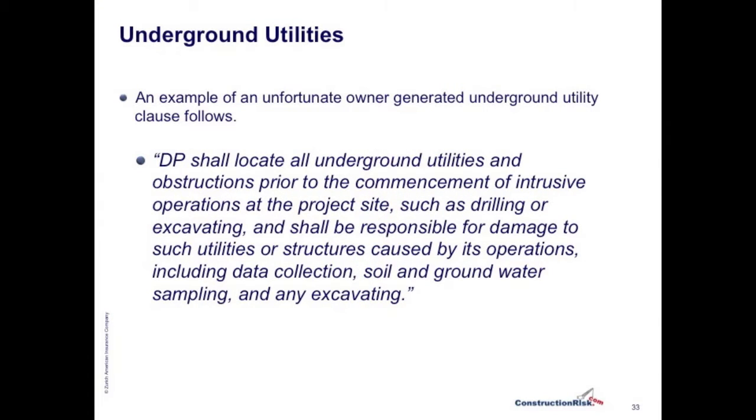Quote, "Design professional shall locate all underground utilities and obstructions prior to the commencement of intrusive operations at the project site, such as drilling or excavating, and shall be responsible for damage to such utilities or structures caused by its operations, including data collection, soil and groundwater sampling, and any excavating." Close quote.